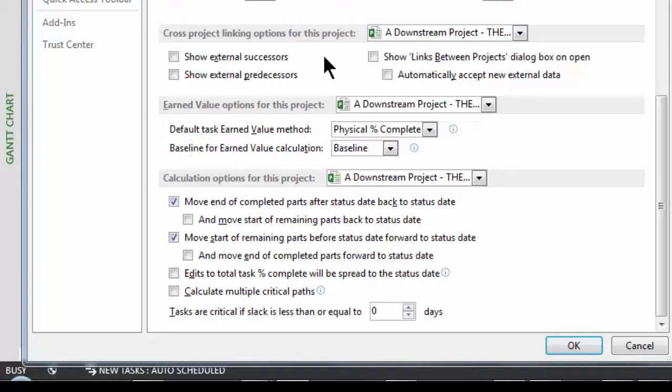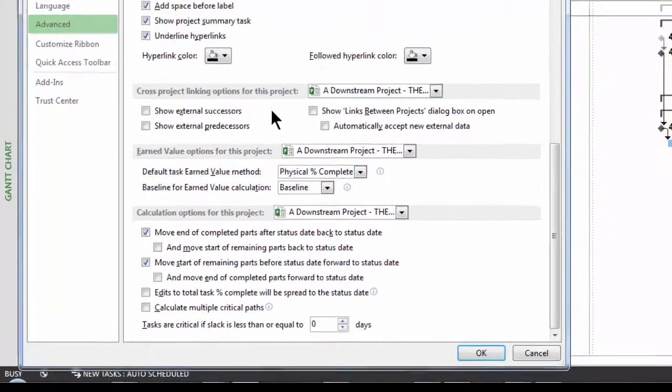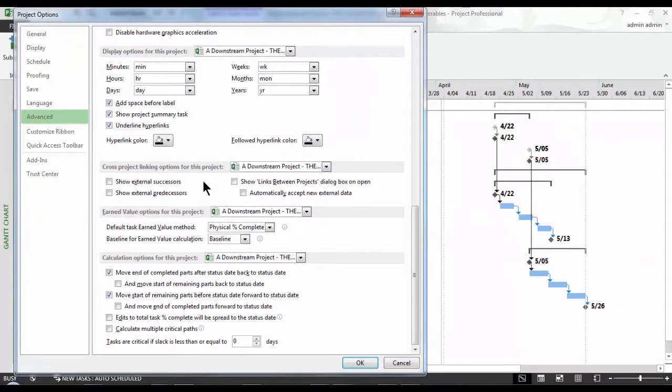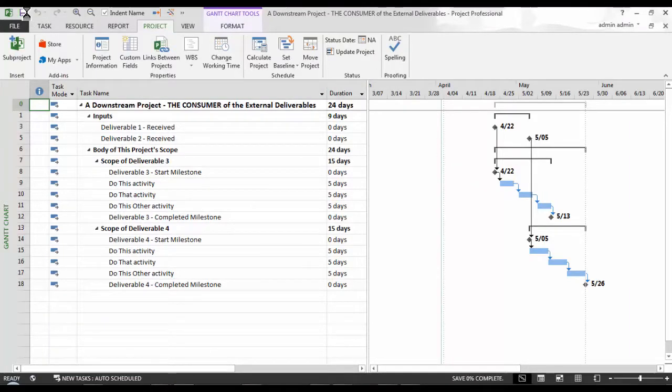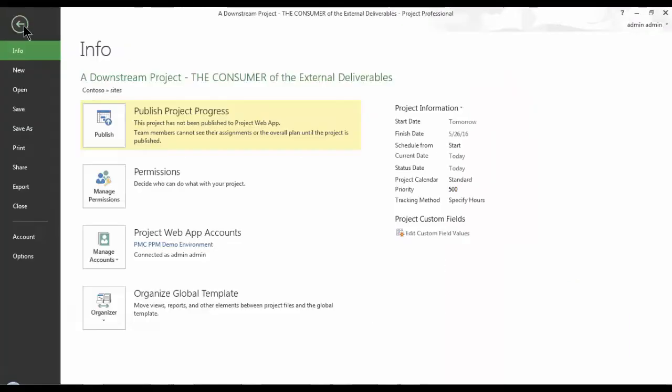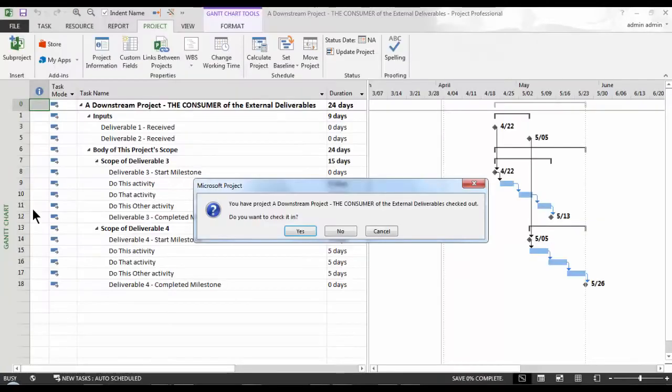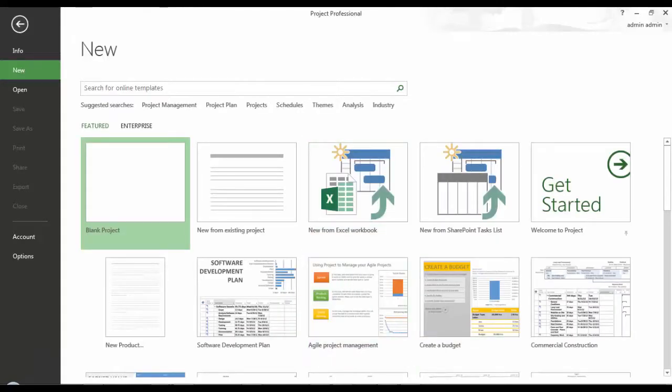I find that there is a risk and a tendency to prematurely or inadvertently accept such changes. As I mentioned during my introduction, project schedules have a tendency to expand and contract, similar to breathing. After all, projects are truly dynamic in nature. Nevertheless, there are standing commitments, deliverable dates, baselines, etc., that projects need and must respect. As such, the upstream project should and usually is given the opportunity to try and recover from a slippage in schedule. So, unless there is a formal change request and a management approval granted, then the projects are asked to hold to their standing commitment by the PMO, client, or sponsor, until instructed otherwise.